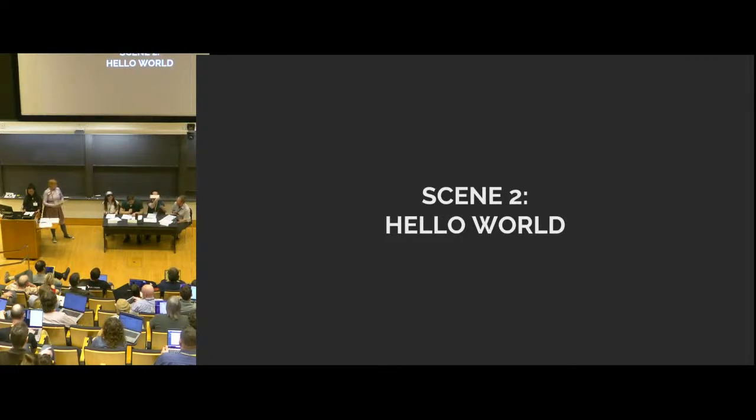I want to remind everyone that we have had to adjust the project timeline because of the rebrand. We were also down a developer because of some departmental shifts. This has taught me that I need to be a little flexible and adaptable with the timeline because people leave, people get sick, and there are many unknowns. Needless to say, we are excited to have you help us move this project forward.